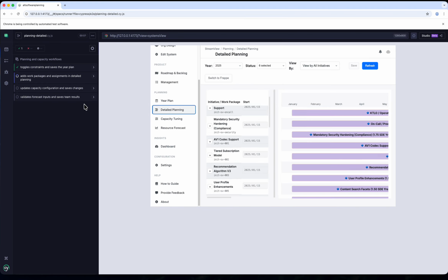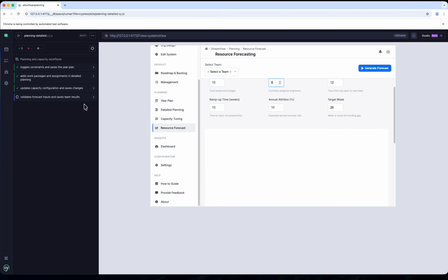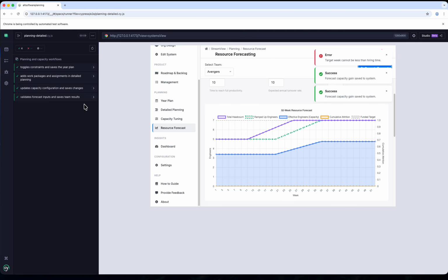What's this? Planning details. Okay, so this is the Gantt chart view I was telling you about. There's lots of interconnected configuration around planning that affects your overall detailed planning. For example, your capacity calculations. A software manager would have to enter their company's leave policies, people's leaves, and so forth. That affects the capacity of your engineering team to do work. And then when you do your planning, you work with the available capacity after you've accounted for leave and training and offsites and on-call and whatever else the team gets up to.